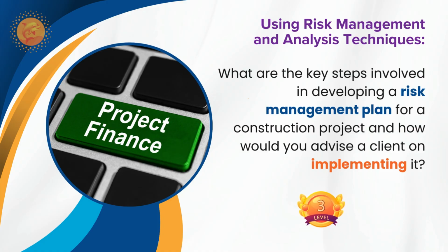The key step in the risk management plan is the mitigation of the risk. In mitigation measures, I will follow the sharing of the risk, transfer of the risk, avoidance of the risk, reduction of the risk, and retaining the risk. With these 5 factors, I will manage the risk in the project. Yes, that is the risk response planning. How do you respond to the risk?